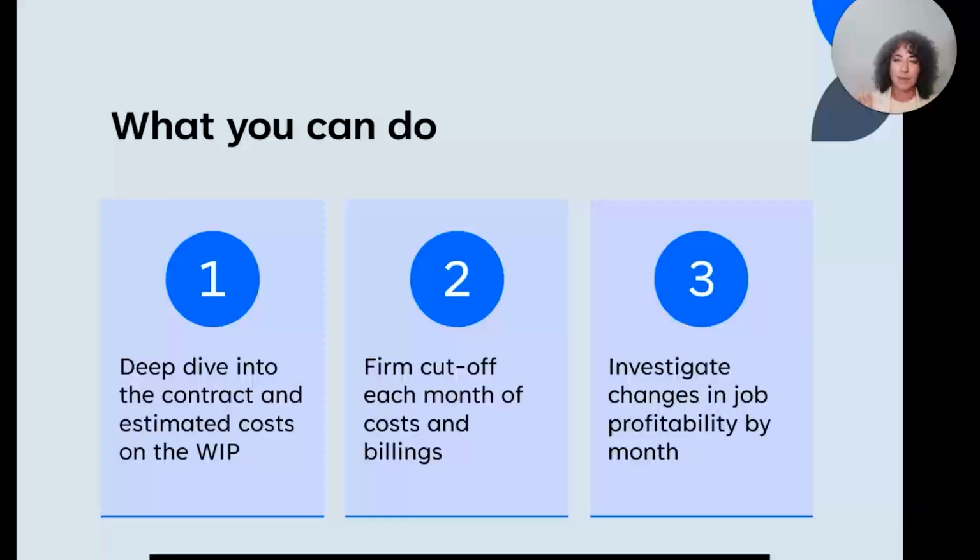Number 2, make sure you have a firm cutoff, that your costs are your costs and they're not changing. Your billings are your billings and they're not changing. This will save you a ton of time and also give you more accurate WIP and financial reporting.